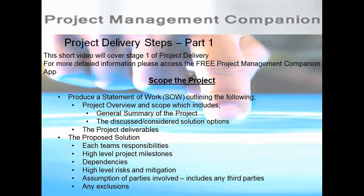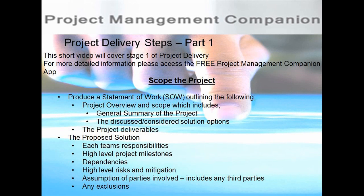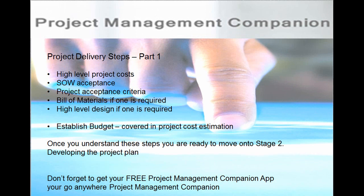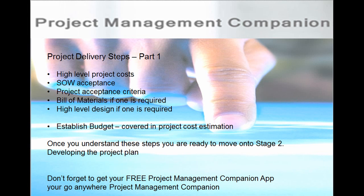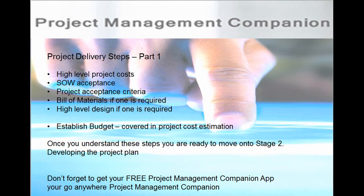Next is the proposed solution, which should cover the following: assumptions of parties involved, which also includes any third parties; any exclusions in the project; high-level project costs; the statement of work acceptance; the overall project acceptance criteria; any bill of materials if one is required; and a high-level design if one is required.